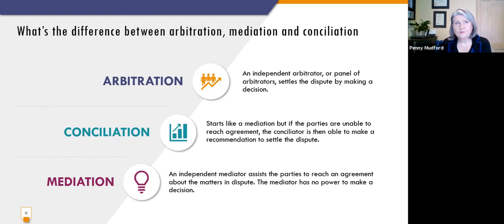Even if you're mandated to have mediation in your contract, you may have an obligation to participate in the mediation, but once you're in the mediation, you don't have to agree to things. It's purely a facilitated, negotiated process where the parties have control over the process and the parties have control over any decision or outcome or settlement that's reached.